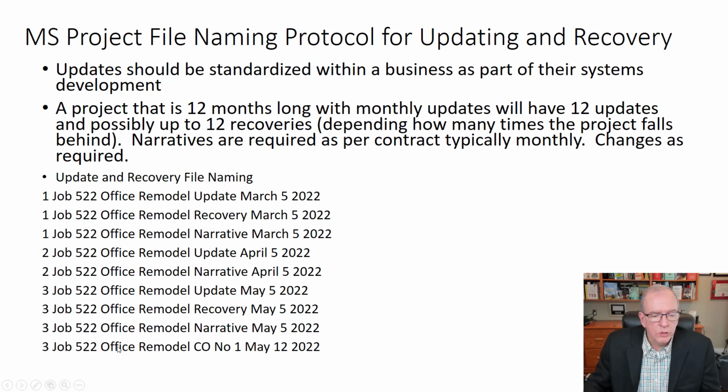And sometimes you may have change orders, things that have changed on the project, and you want to see how this change impacts the rest of the project. So you should be able to save them at those points in time, at those status dates, so you can see what happened. So this will be telling us the history of the project. This is the history of what happened during that first 3 weeks that we just updated. This will be showing how you plan to fix the 4 days that you were delayed, right? And you would explain that in a narrative document, what delayed you and how you plan to get the time back.